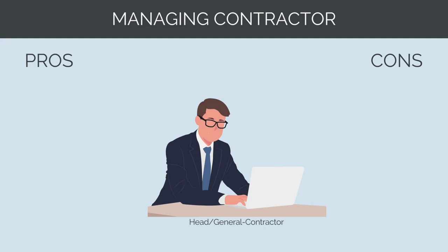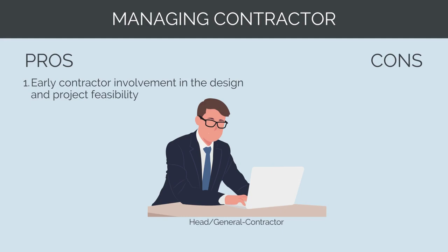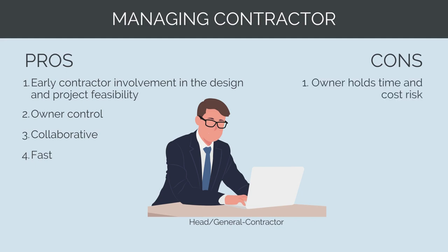Looking at the pros and cons of the managing contractor model from the perspective of the owner: the main benefits are early contractor involvement in the design and project feasibility, value engineering services, and identification of constructability issues. The owner maintains significant control through the project lifecycle and does not have to pay expensive variations for changes. It's a collaborative model and it's fast to get going — the project owner doesn't need a lengthy tender process. Some negatives are that the owner holds the ultimate time and cost risk, there is uncertainty around time and cost, and the project owner won't benefit from price competition between contractors.